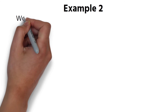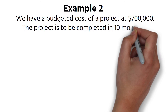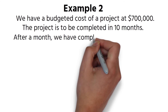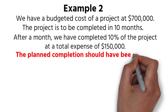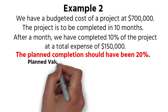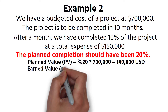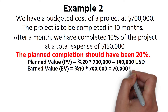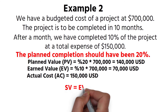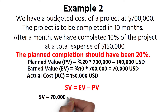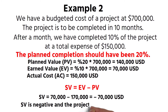Example 2. We have a budgeted cost of a project at $700,000. The project is to be completed in 10 months. After a month, we have completed 10% of the project at a total expense of $150,000. The planned completion should have been 20%. Planned Value = 20% × $700,000 = $140,000. Earned Value = 10% × $700,000 = $70,000. Actual cost = $150,000. SV = EV − PV = $70,000 − $140,000 = −$70,000 US dollars. SV is negative and the project is behind the schedule.